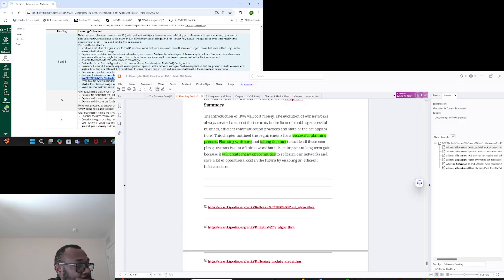Your governance board must necessarily include all your stakeholders. All your stakeholders are not just the network implementers and their consultants and experts, but anybody who will be participating, any discipline who will be checking their services after we've done the deployment. All those must come onto the governance board: the CTO, the various department heads.